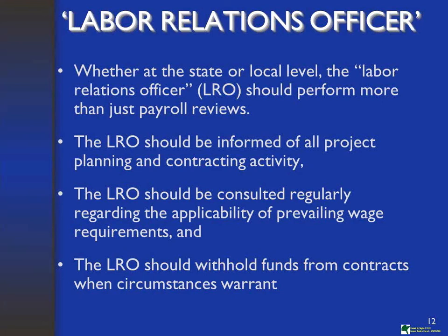Let's say the current project is closed, all funds have been dispersed, and then there's another activity with the same contractor, and you found an issue over here, but closed the project, and now the contractor is on another project. Same contractor, prime we're talking. You can cross-withhold, even though there was an investigation on this closed one, on this new project that's active and has funds to possibly withhold.